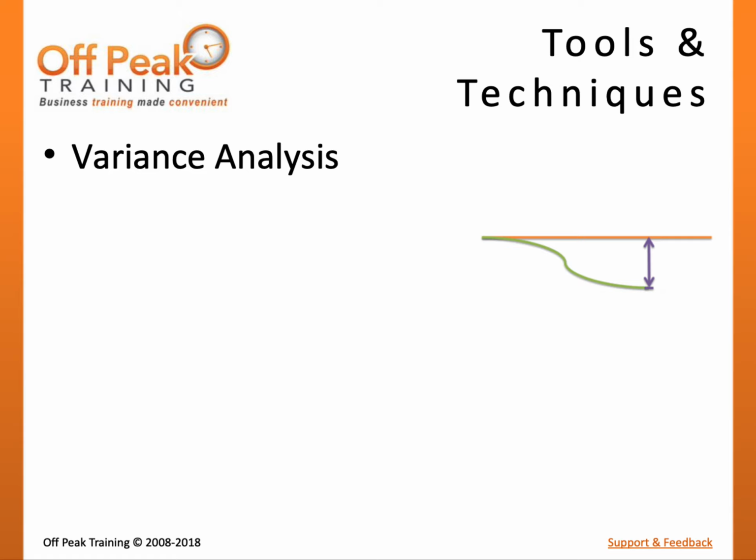Variance analysis is the technique of comparing actual costs for work completed with the planned costs of that work in the cost baseline to detect variations. Cost variances can be used to determine if corrective or preventative action is needed. This may include earned value analysis and trend analysis.